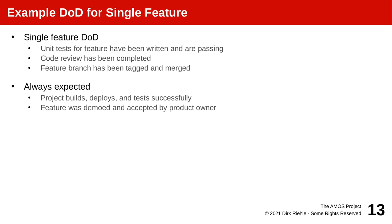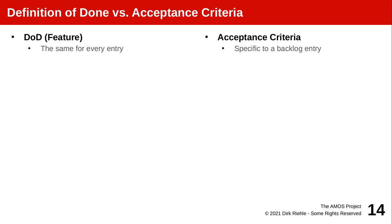You need definitions of done for these different levels. You can see this in the planning documents where you can document the DoD for different levels. For a single feature, it could be something like: unit tests have been written and passing, code review was done — there was always a sign-off by another person, and so forth. Really make sure that you don't confuse definition of done with acceptance criteria. The DoD for a feature is the same for every feature — you cannot and should not vary it, while acceptance criteria are necessarily specific to that backlog entry.